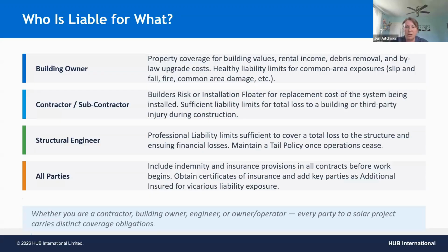The structural engineer and anyone doing design work really should carry professional liability limits, and you would want it to cover the loss of a structure. And then, of course, maintaining a tail policy or extended reporting period once their operations cease. Or the other way we've seen the language is 3 years following the completion of the work, or for no less than 3 years following the completion of the work.